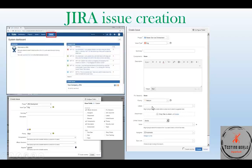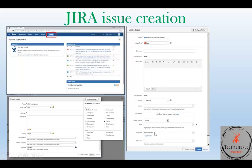Priority, labels — labels work like keywords. You can mark different types of bugs, for example functional bugs, UI bugs and so on. Another cool feature of JIRA is the ability to link one issue to another. For example, this bug may be related to a specific user story, so you can select the drop-down and choose the option 'relates to' and select the related user story. Next is assignee — the person to whom this issue will be assigned. You can also add an epic link if you have an epic for this item, and fields for logging time and estimates. Then you click the create button.